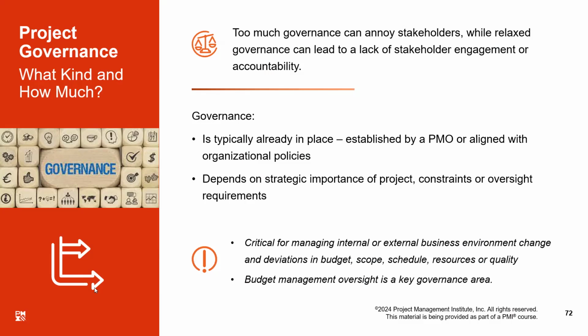And they will be like a consultant to the project manager or the program manager or the portfolio manager, whatever level of governance is needed. So I am not really saying that the PMO develops all the governances, but I'm saying the PMO assists the sponsor in developing the requisite governance, and then it is issued by the sponsor to the project.